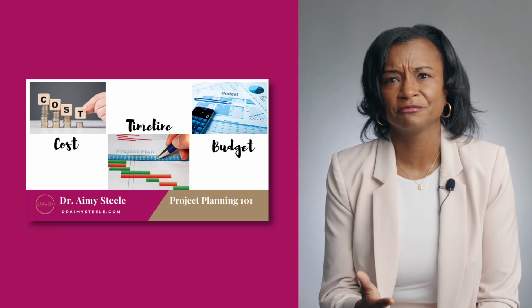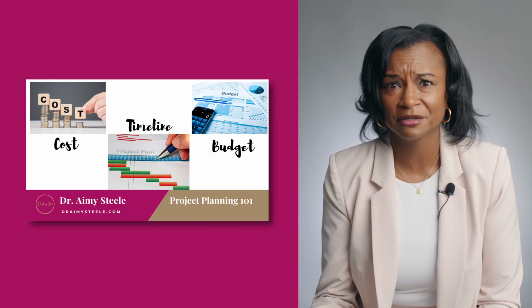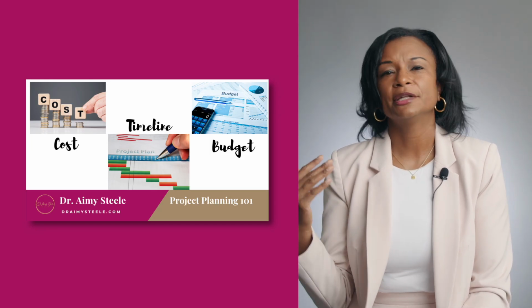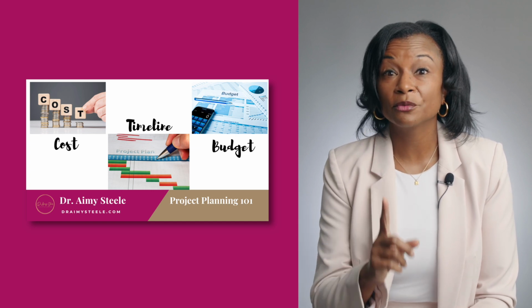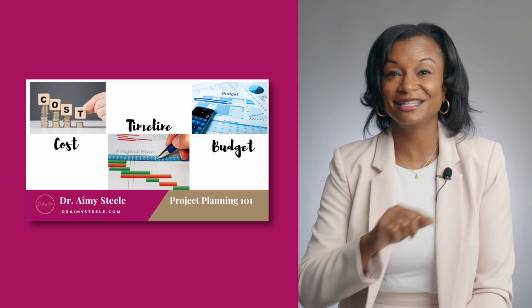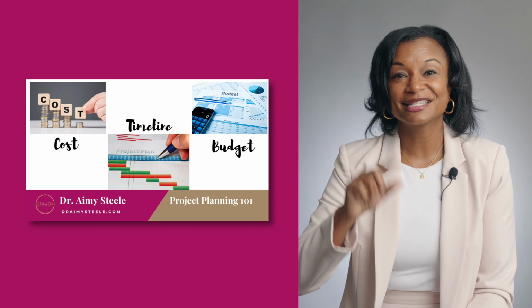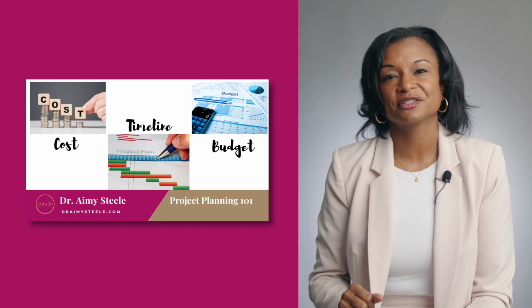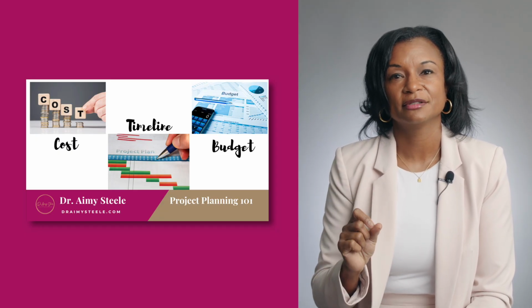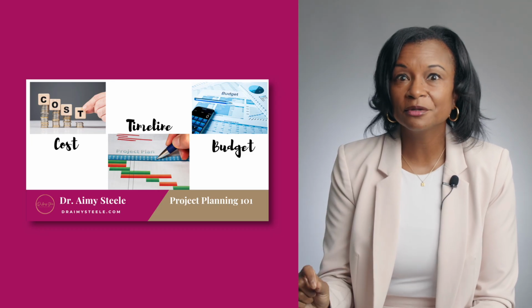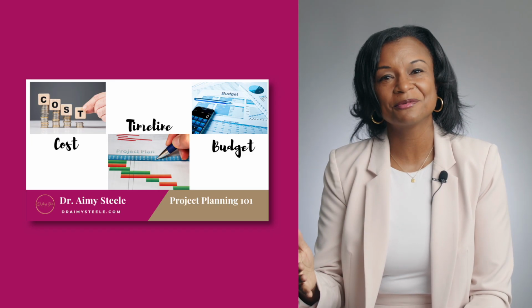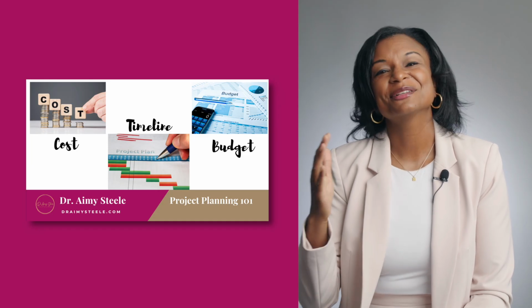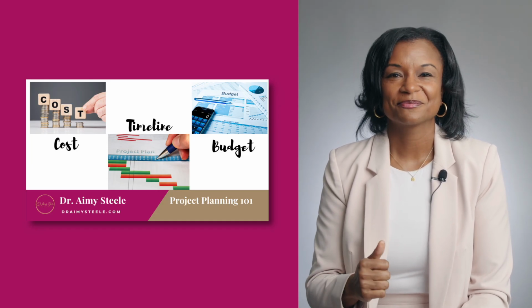And you've got financing ready to go, right? And there are no environmental concerns and no hazards, and all the utilities are there and everything works just perfectly. Oh, and the weather's good. All of those things have to be in existence at the exact same time in order for that project to have a shorter timeline. So know what your proposed timeline is, but also plan a few contingencies in case things don't go right, because they won't. So make sure you understand your timelines.